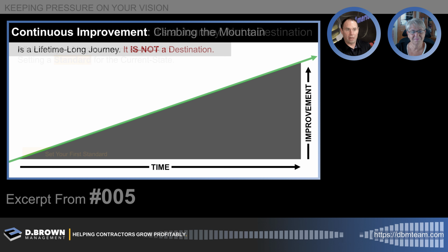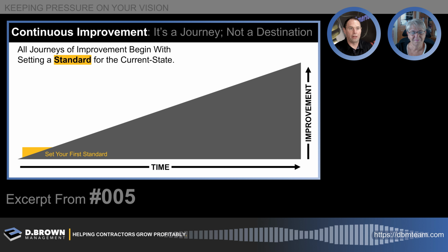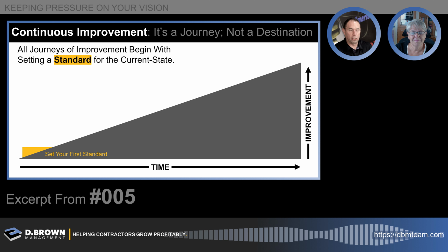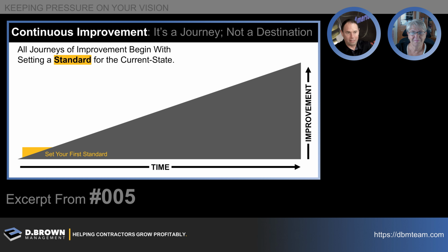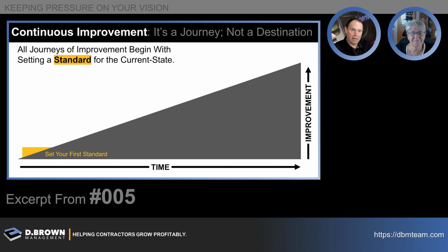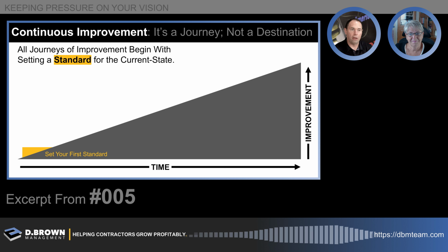And there's kind of a standard for doing those installation tasks. The first standard is the standard estimating units that we're using to estimate the job with, wherever we got those from. That's the beginning of the standard: we're really hoping that we're going to be able to go out there and install the things out in the field for this amount. And that goes the same as you move into any of the office management side, of processing an RFI or a submittal or whatever it is.